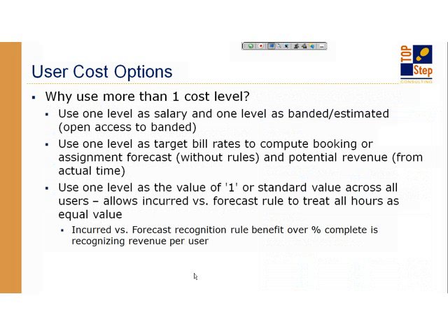basically every hour that a person puts on a timesheet, the target bill rate for that hour should have been, maybe $50 an hour, and then based on what the project actually is doing, the project may have been discounted to be $40 an hour. So now you have an ability to track what was your target bill rate for that person. So what the project cost should have been based on the hours versus what was actually billed based on the negotiated contract, and the difference obviously is sort of the opportunity loss based on negotiation.